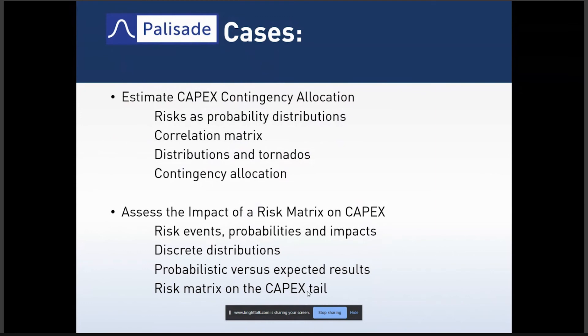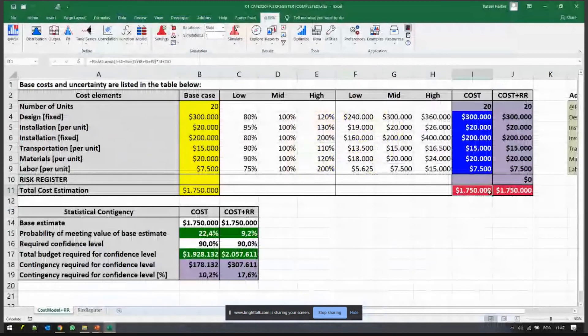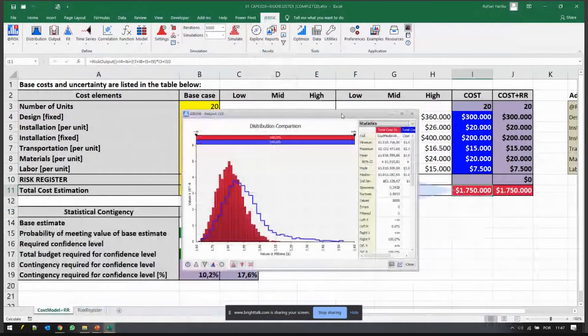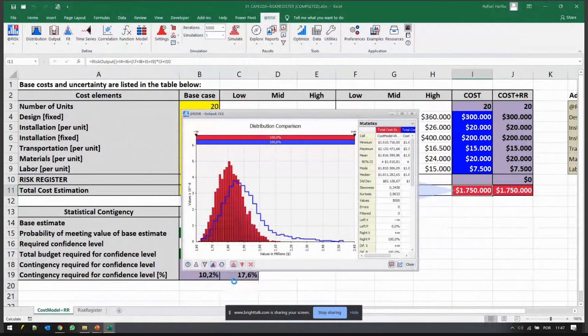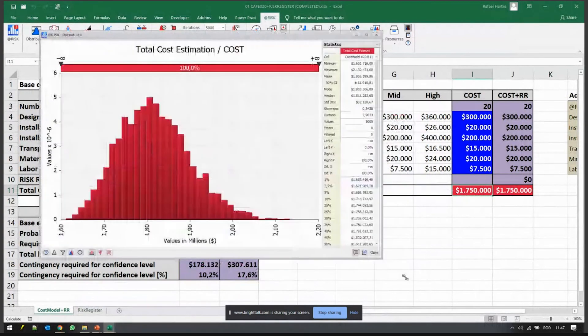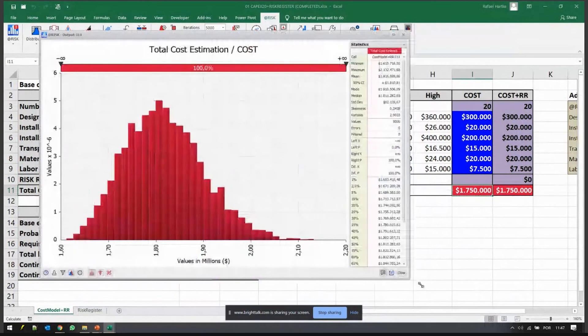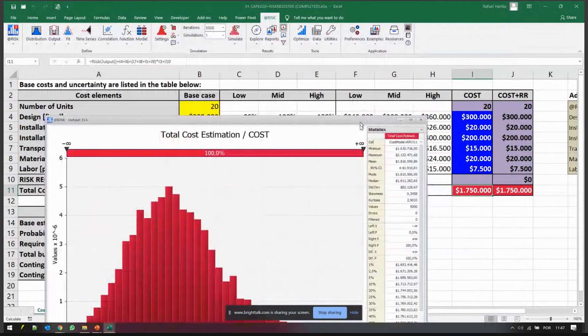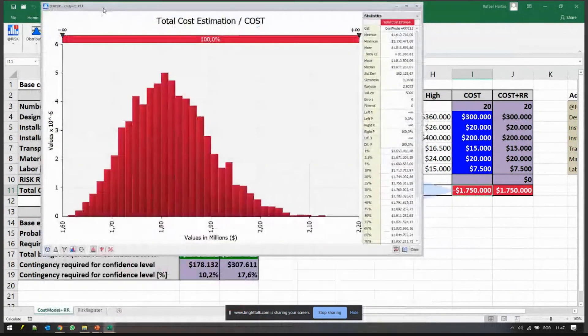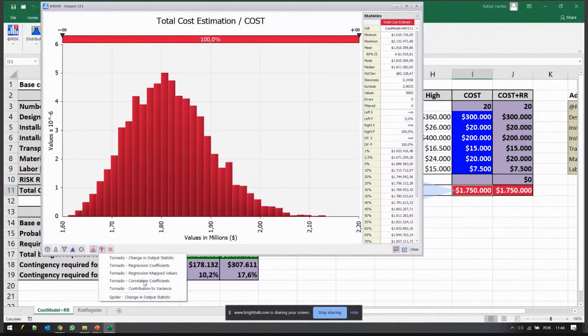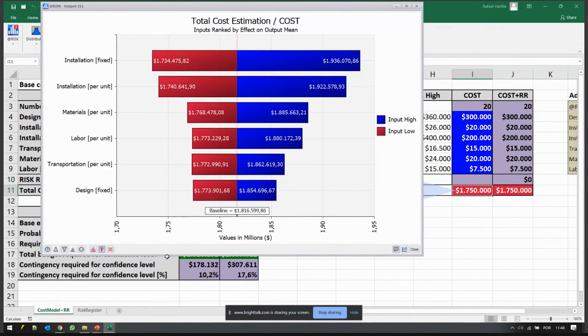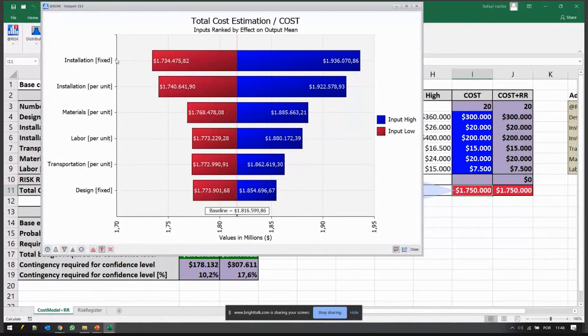There's a number of other things we could explore here. For example, if I want to rank what are the most important risks to mitigate, we have tornado charts and a number of sensitivity charts to help us understand where the risk is coming from. It seems yes, installation fixed cost is the top dog of the pack here, it's the alpha risk of the whole thing.